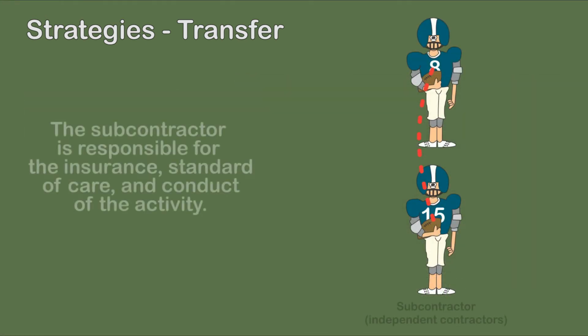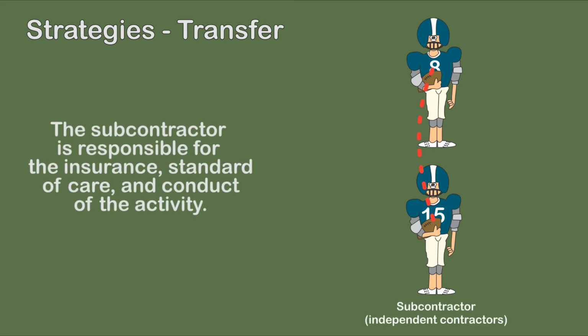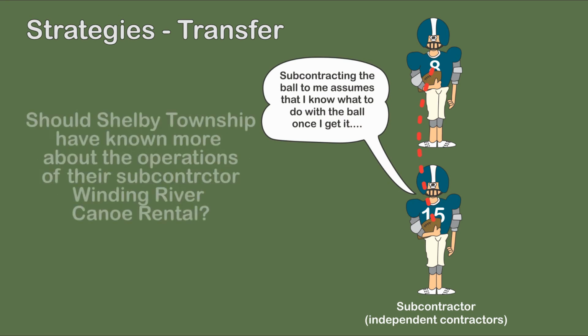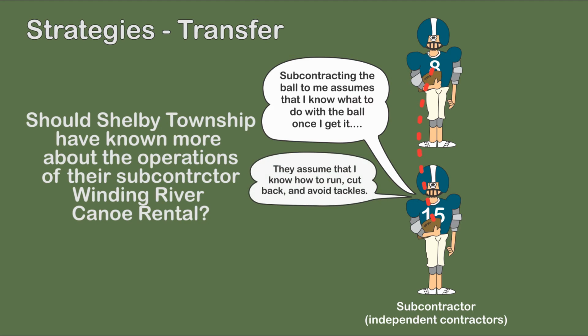Subcontracting attempts to transfer the risk of loss to the subcontractor performing the service or activity. Shelby Township subcontracted the canoe rental business to Winding River Canoe Rentals. They were excused from the lawsuit brought by Melanie's estate.